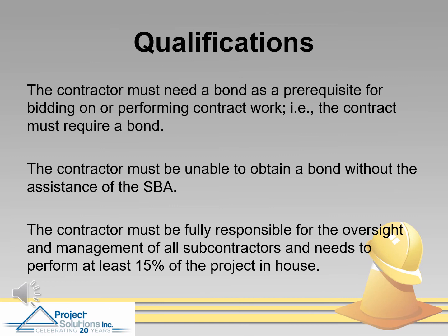The contractor must also be unable to obtain a bond without the assistance of the SBA. The contractor must be fully responsible for the oversight and management of all subcontractors, and the contractor who is obtaining the bond needs to perform at least 15% of the project themselves.